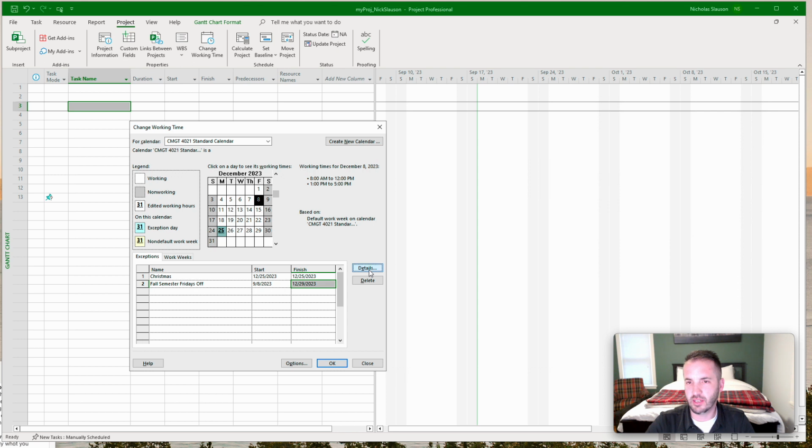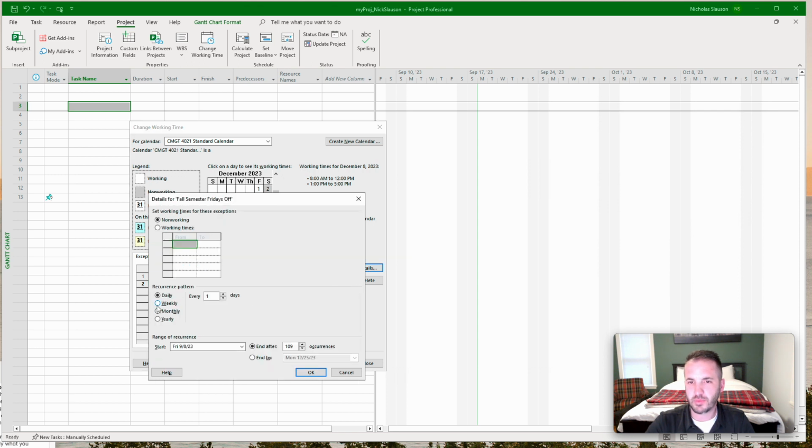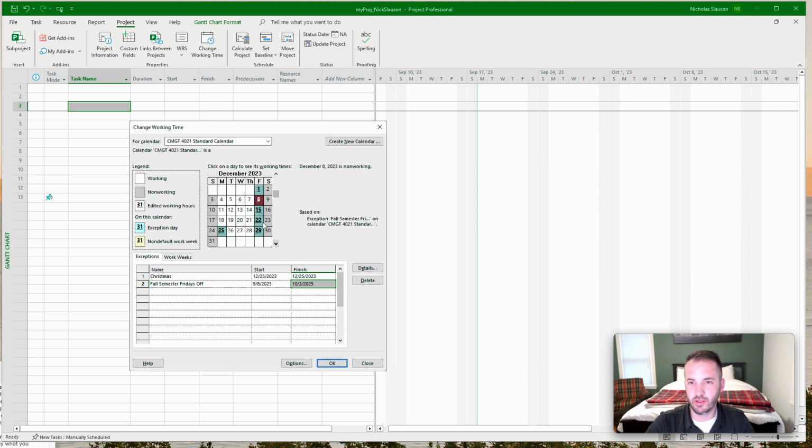And we're going to get the details here. We're going to say weekly, every Friday is now non-working. So hit OK. And we can see in here that all these Fridays are now set to non-working.